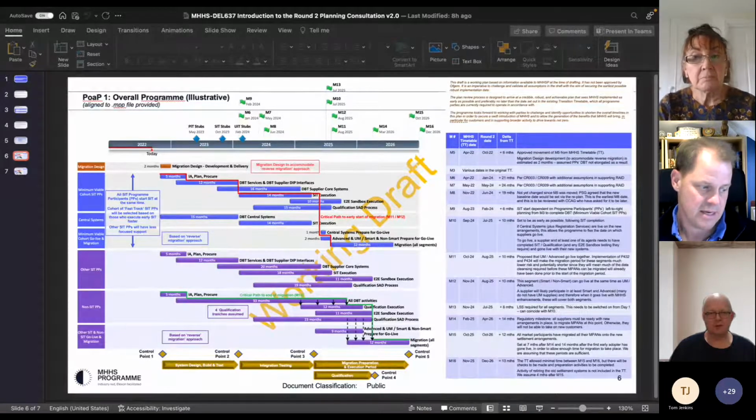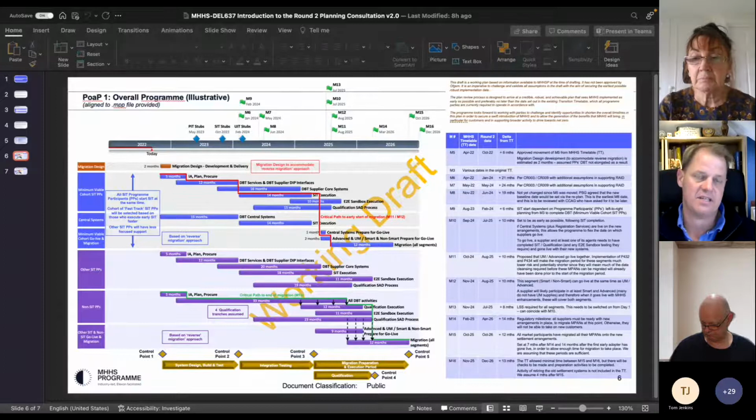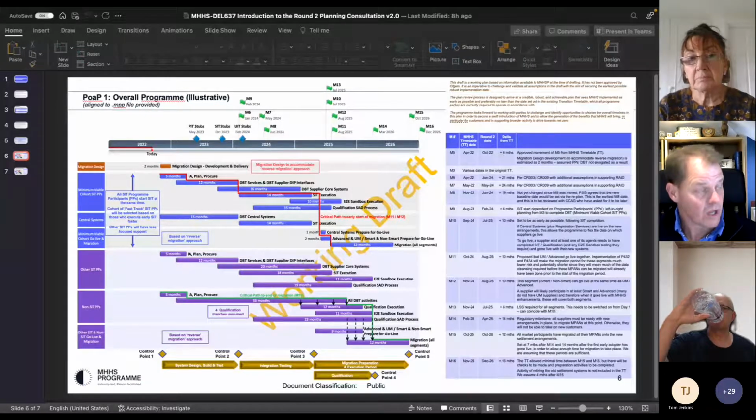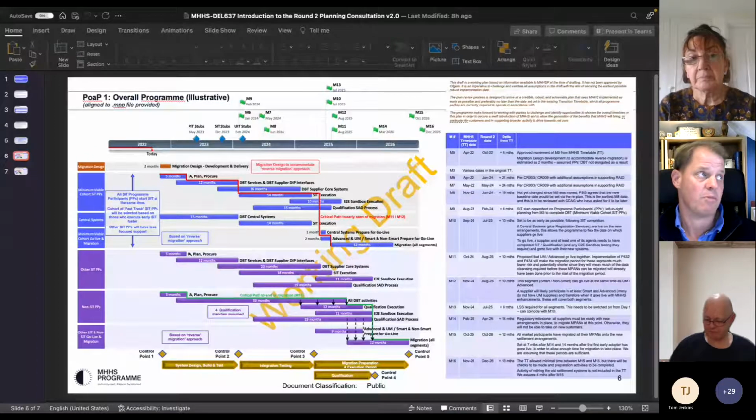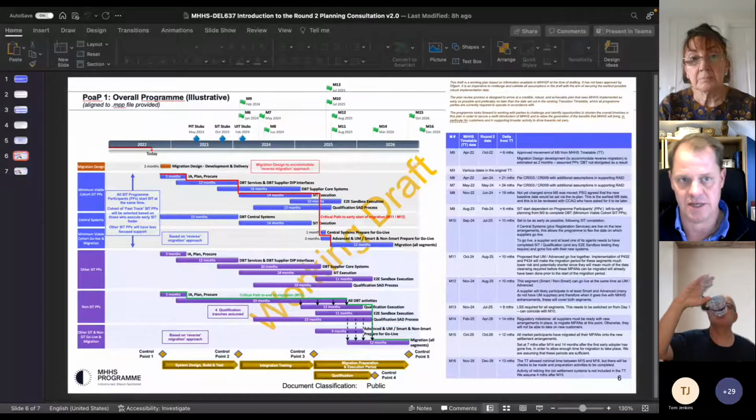where the risk sits. And one of the things we were talking to with St Clements, again, sorry, Chris, to highlight some of the bilaterals we've been having, is if there's an element of build activity required for reverse migration, can we concentrate on having a drop of the software available for SIT functional testing and separately do the design, build and test with a second drop of the software to feed into SIT migration testing. So there are some options to give us a bit more flexibility on the delivery timeline as well, but it'd be really good to get that as feedback from the plan consultation.